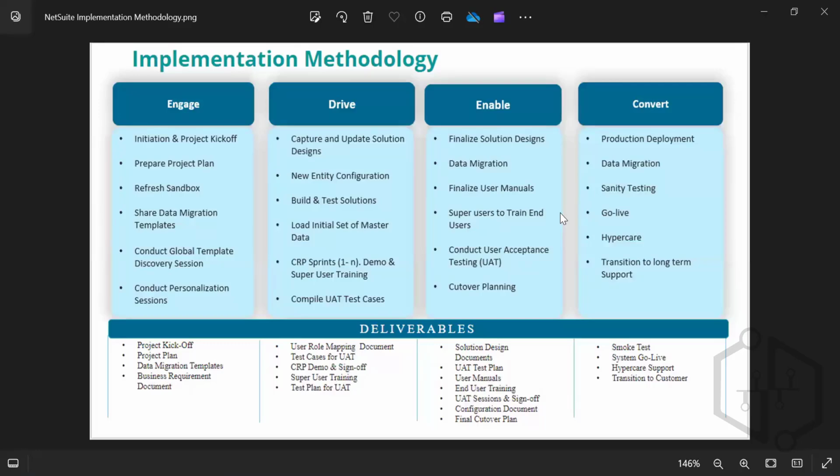Okay, so the business requirement document is nothing but you get in touch with the client, you understand their requirements as a business analyst. There is a business analyst as part of that particular project. They take the complete requirement, and then the business requirement document is built. When a technical resource talks with the client about the customizations, then there is a technical requirement document which is done. And then there is a functional requirement document as well. What all functionality is included within the project? Do they have procurement? Do they have sales? Do they have manufacturing? Or do they have project to cash? Whatever it is, a functional requirement document is prepared for that.